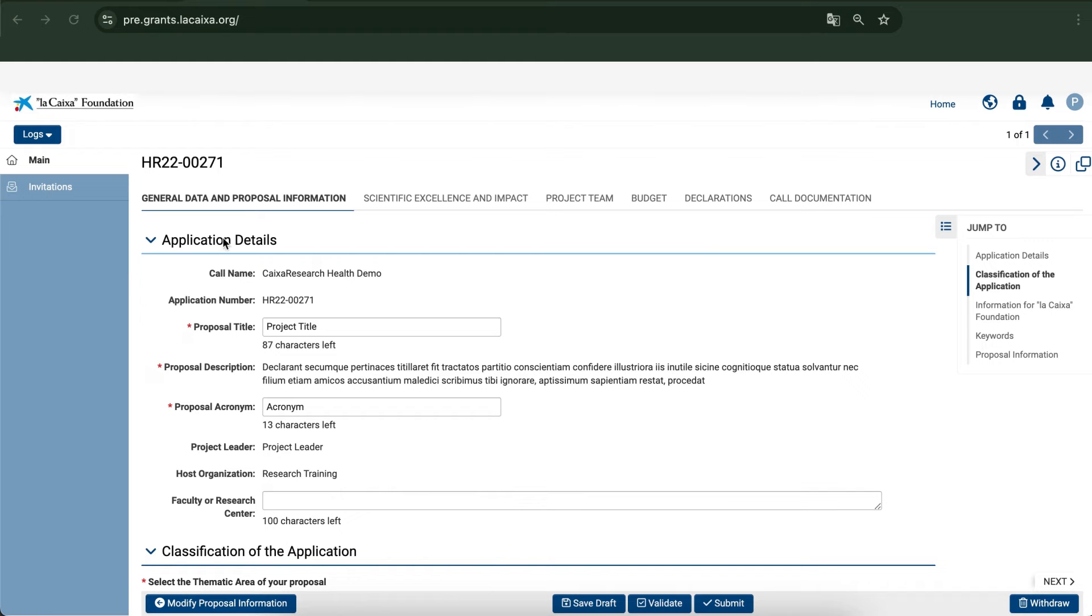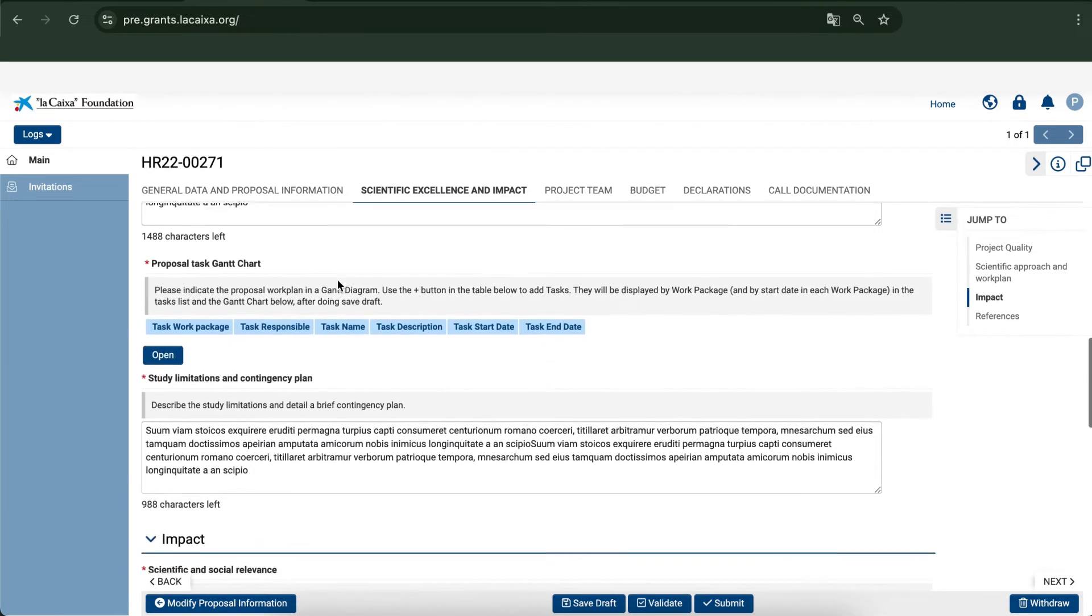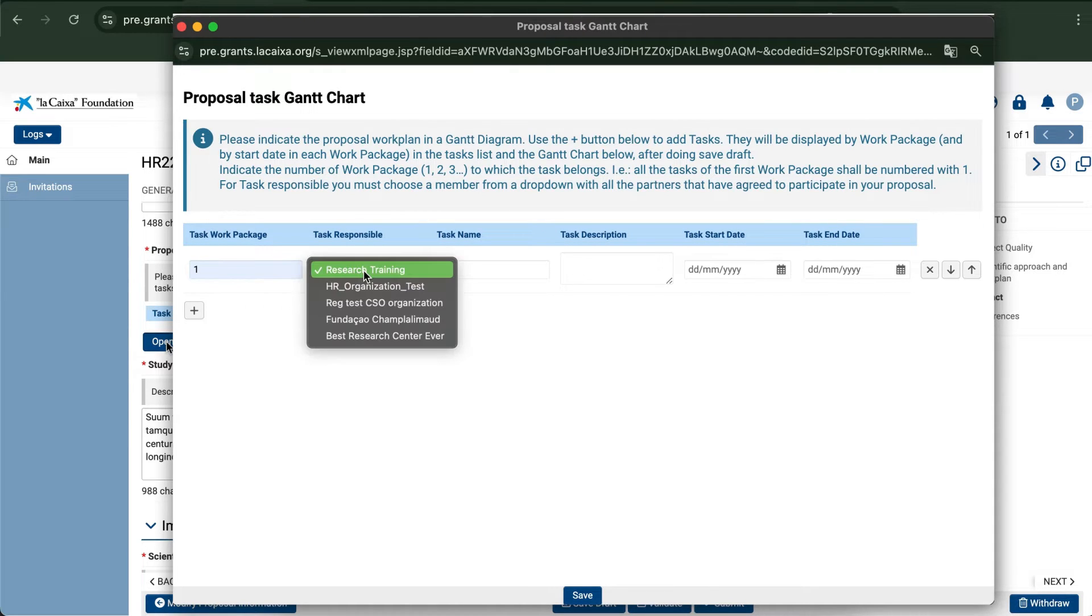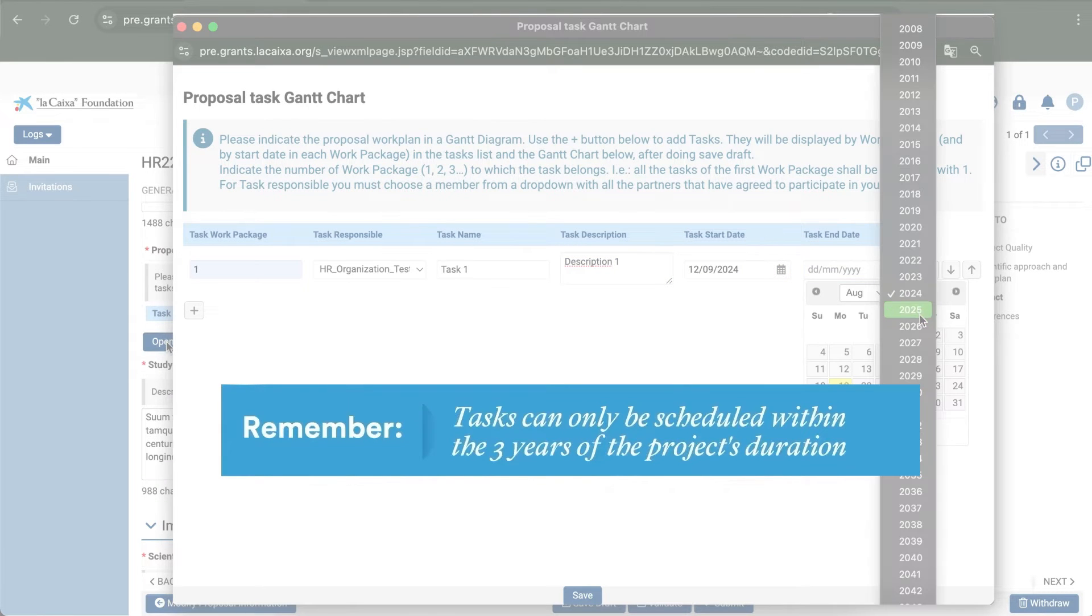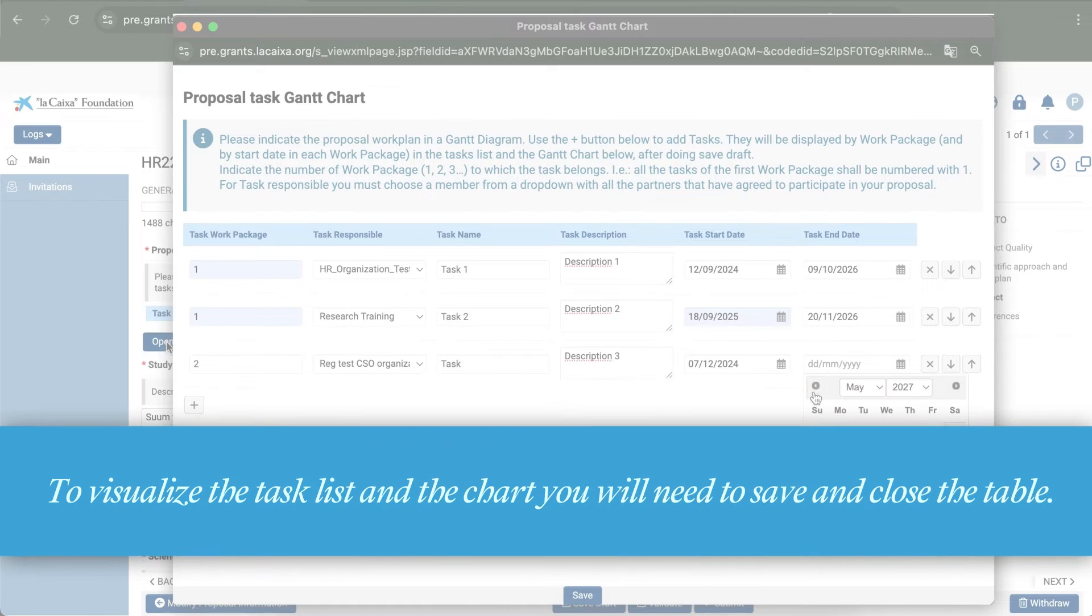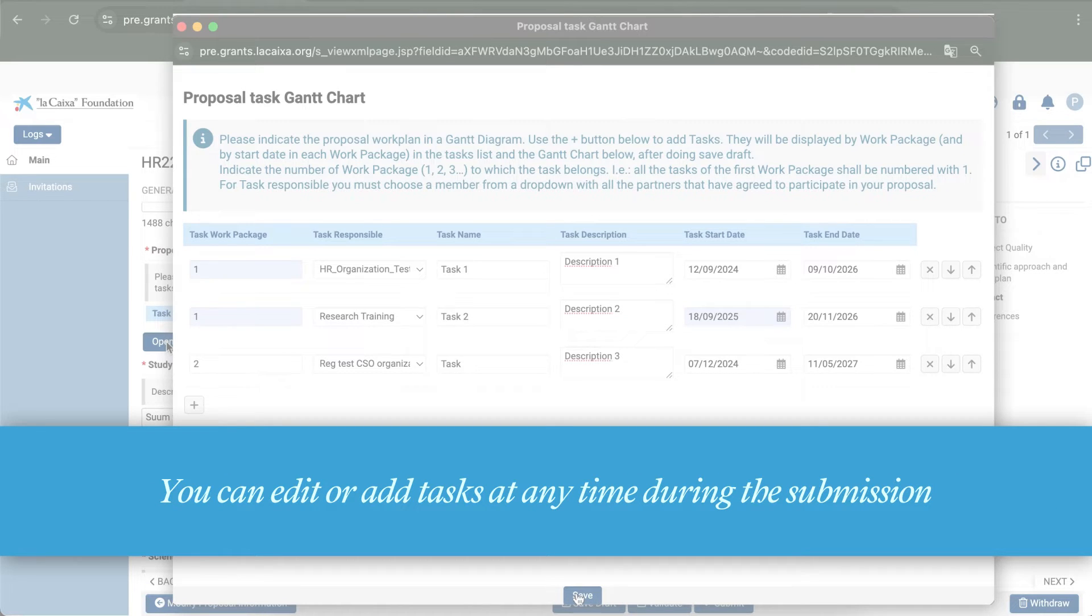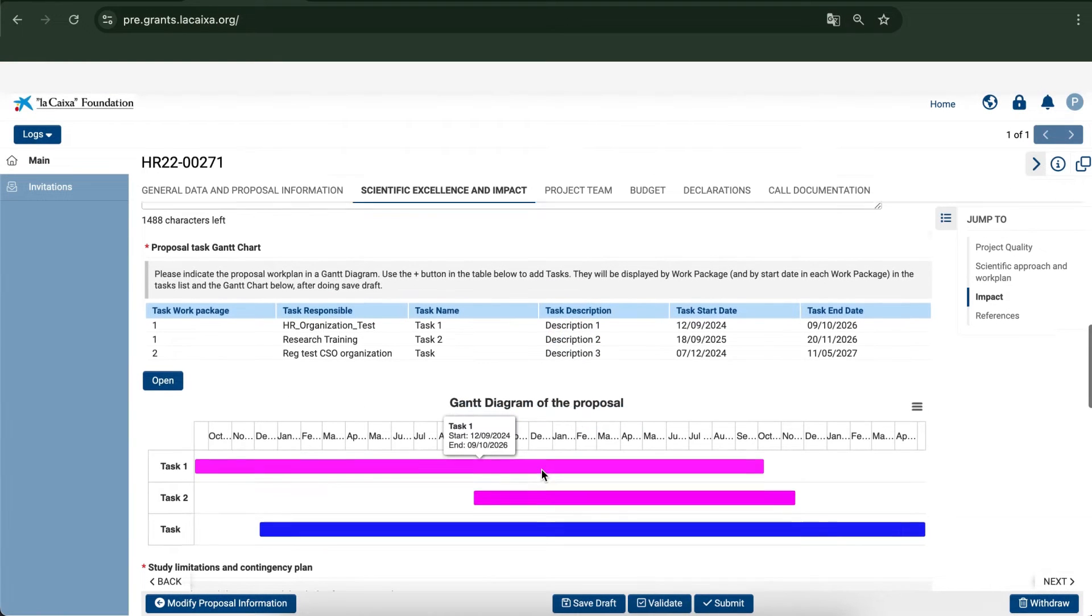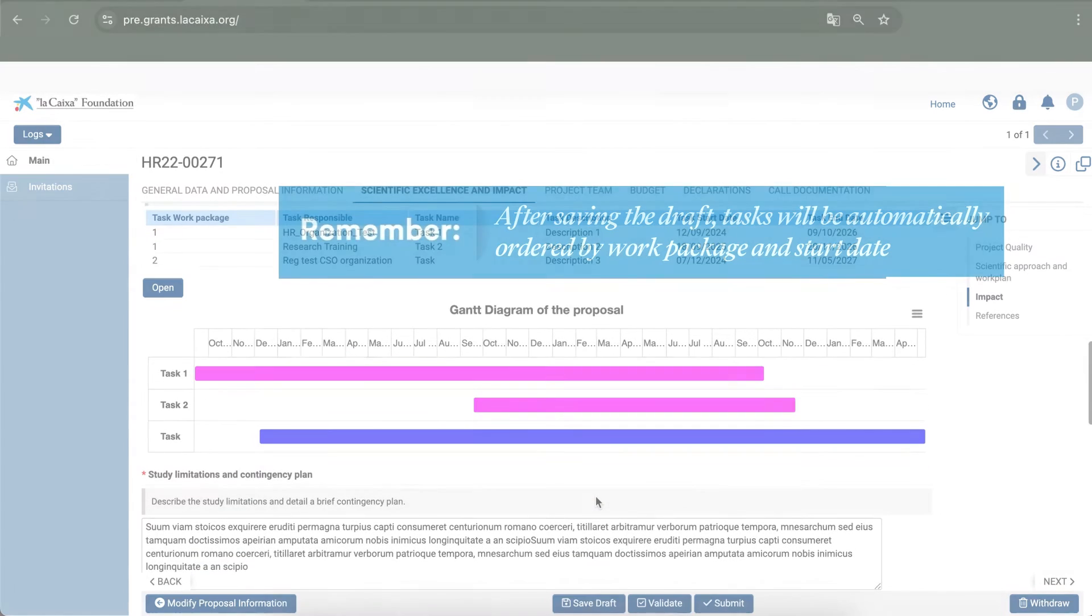As project leader, you have to create the Gantt chart for your proposal in the Scientific Excellence and Impact tab. Record the different tasks involved in your project and enter the details. Remember that tasks can only be scheduled within the three years of the project's duration. Once the information is complete, save the draft to see all the tasks in the list and Gantt chart.